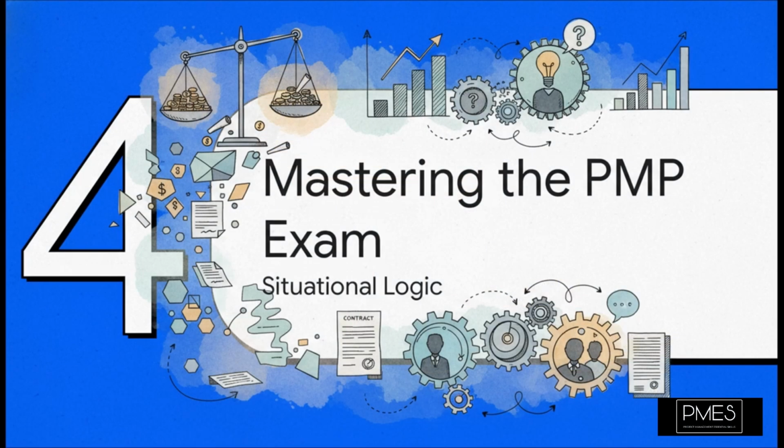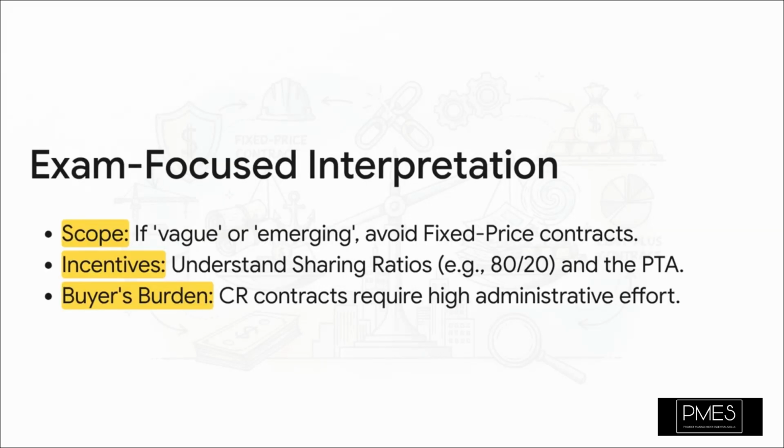Okay, let's switch gears and focus squarely on the PMP exam. The test isn't just going to ask you for definitions. Nope. It's going to throw a scenario at you and expect you to apply all this logic strategically. Here are the keys to absolutely acing those questions. If you see keywords in a question like vague or emerging or unclear, your brain should immediately scream avoid fixed price.